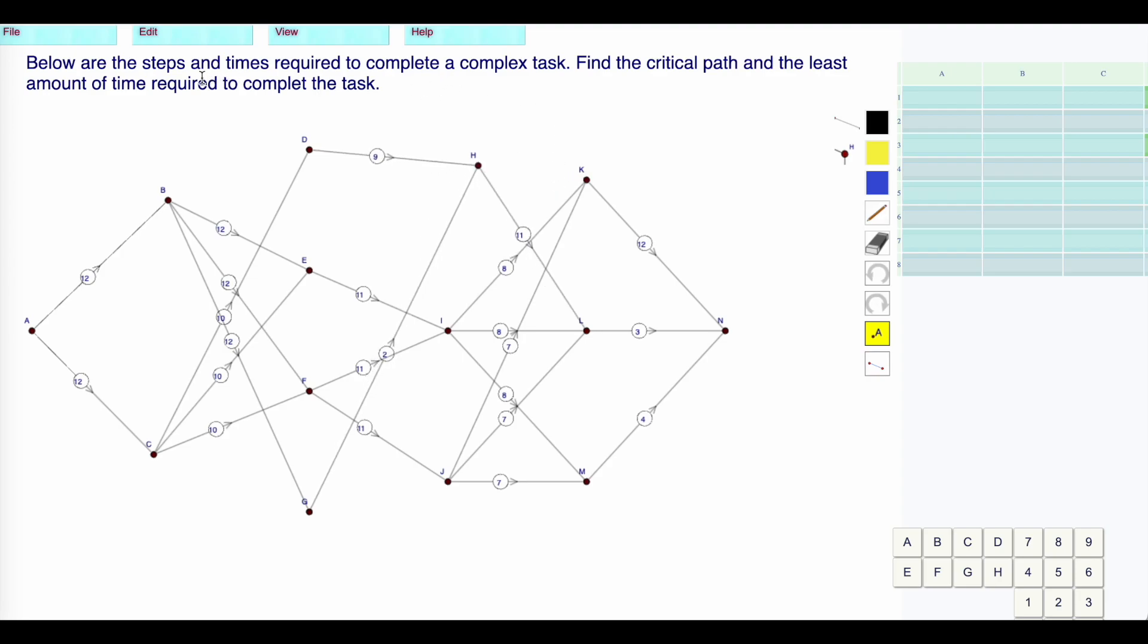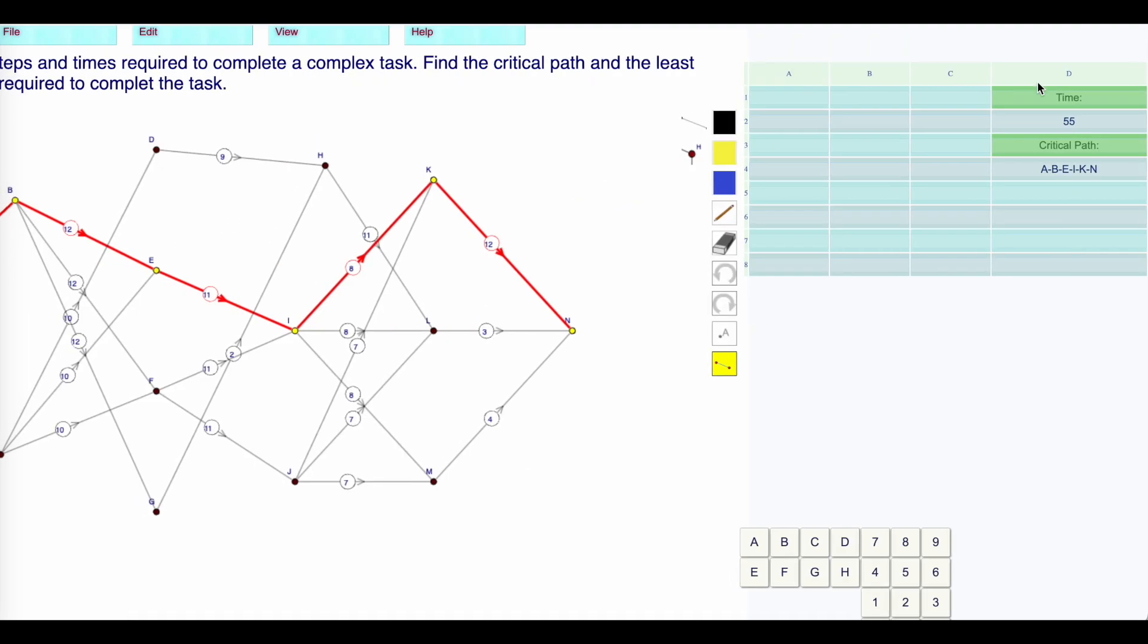All right, now I want to find the minimum time required to complete this complicated task. That is the maximum path. If I start with 12, let's say I move to this one which brings me down to an 11, or I can move to this one which brings me to another 11, or I can go to this 11 and up to here. I have an 11, I have an 8, then I have a 12. That has a weight of 55.